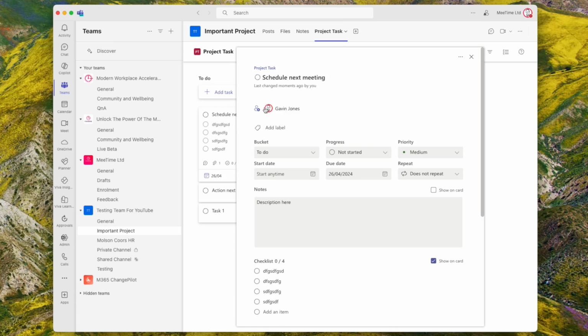So if you did want the same task to be completed by different people, the best way to do that is, rather than having one task with multiple people assigned to it, because then that's just one thing that multiple people are working on. As soon as one person clicks completed, it makes it complete for everyone else. An example, in my corporate job, we used to have the same thing that people need to enter in their forecasts across multiple different accounts. You can't then create one task saying, put this new product in your forecast and assign it to 50 people, because then if one person completes that task, it makes it complete for all those 50 people, and 49 of them might not have completed the task yet.